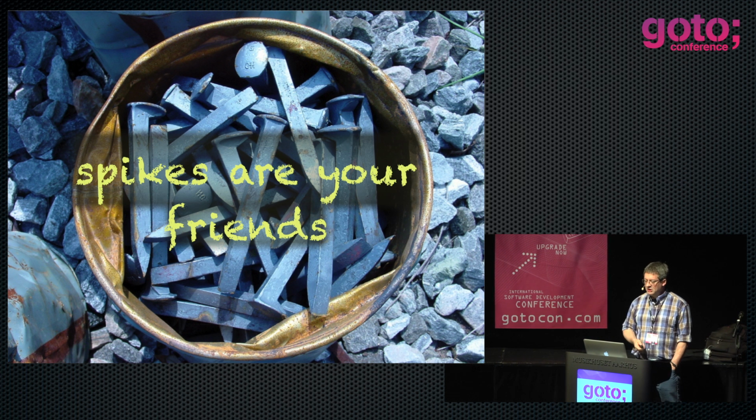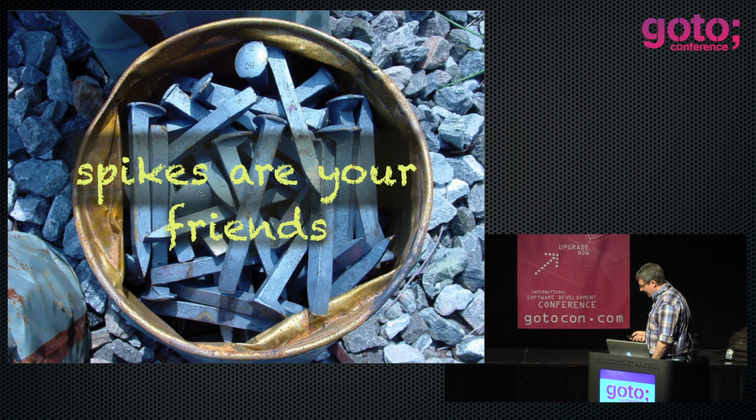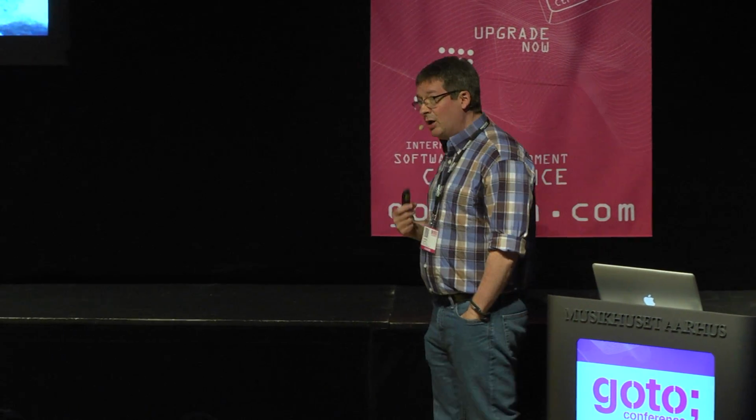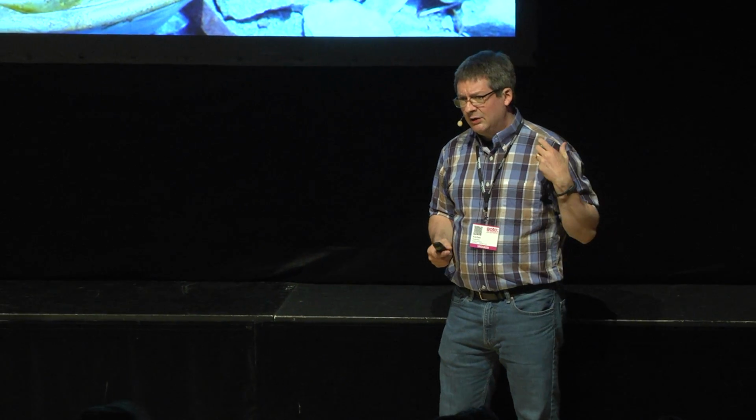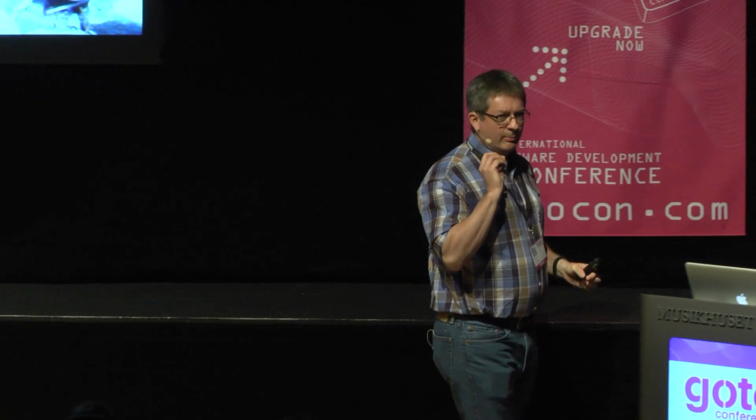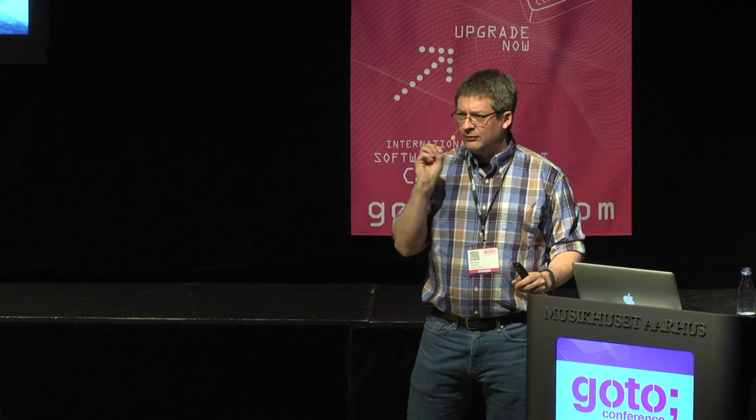There's another really famous anti-pattern called the give-me-estimates-now anti-pattern. The way this pattern manifests is that somebody asks you to estimate something and you don't know anything about it, like, tell me how much it's going to take to add geocoding to this application. And the really dangerous thing here is to guess, because the give-me-estimates-now anti-pattern says that as soon as numbers come out of your mouth, you have inadvertently entered into an ironclad contract that you'll risk your life to make that date come true.